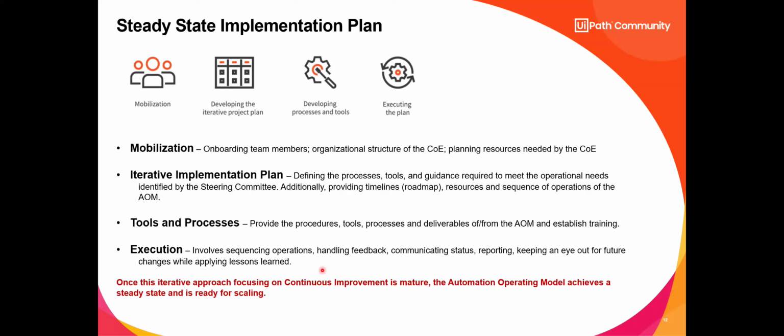It took us about 6 months, and testing took about another 6 months. But it saved that organization millions of dollars a year because they were able to get rid of vendors and contractors and even an entire system just by doing that automation.